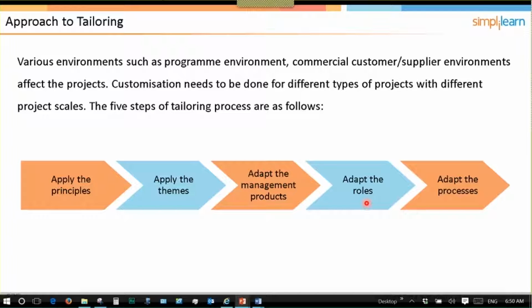You definitely would need to have a project executive, a senior user, and a senior supplier. Now, those don't necessarily have to be separate people. For example, if my project is about upgrading my infrastructure for IT, and the IT CIO is both the supplier and the customer, then the roles both still exist, but I have one person doing it. That is not the norm, though. Normally, you would have at least those three perspectives in different people. So I need those three people on the board.